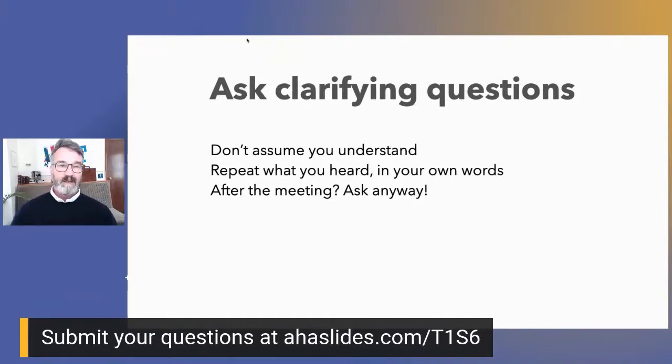And then after the meeting, you may still have questions. Don't forget about this. Just ask anyway. But if you do ask those questions, you want to make a list of those questions, sort them logically, and then send it to the client one time. You don't want to be peppering the client with questions as you go through, because then it's annoying for them. It's disruptive to their workflow, and you look scattered.